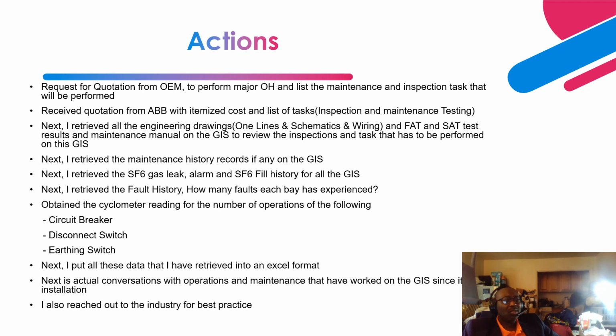So the first thing I did was to request a quotation from the OEM to perform a major overhaul. As part of the request, I had a Teams call, and I asked the OEM to put a scope together of all the maintenance and inspection tests that they are going to perform. They also provided their costs, how much it's going to cost to provide those services.